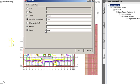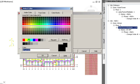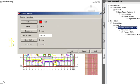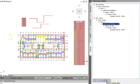After clicking OK, I click on the labor factor entry and mark it red to indicate the adjusted labor factor — that's how I color-code the drawing to track what's been taken off and at what labor rate. Finally, I simply click 'Export Estimate Data' and that sends the data out to select estimating systems that will import it. That concludes an overview of AutoCAD MEP Fabrication by East Coast 2012.